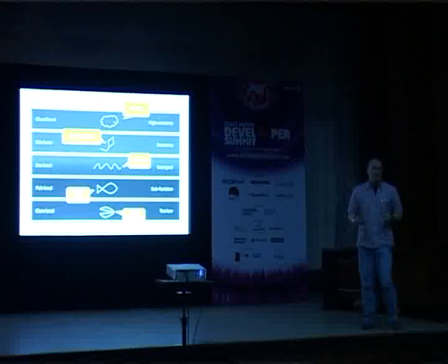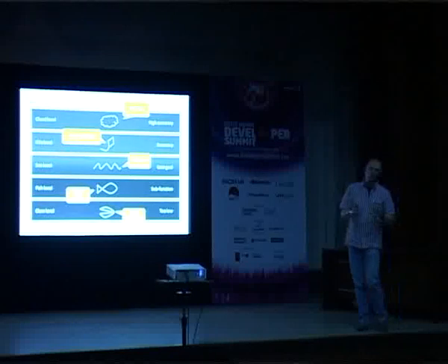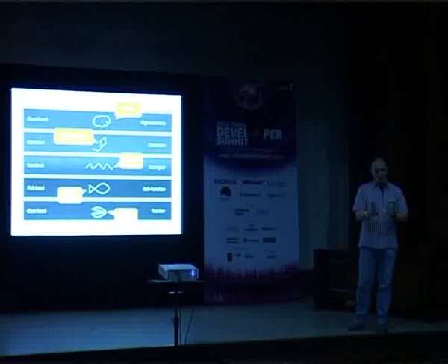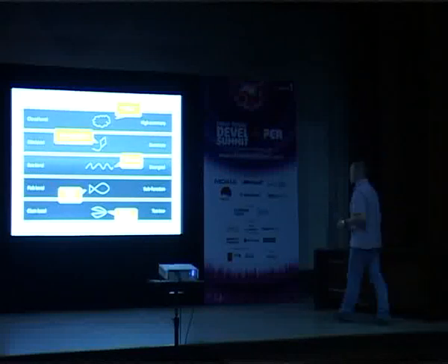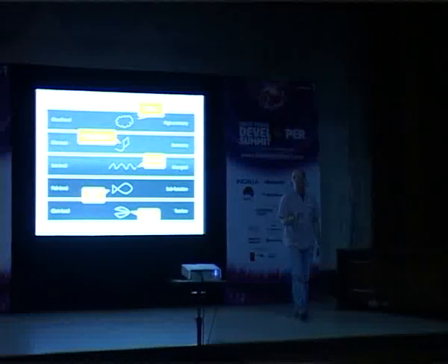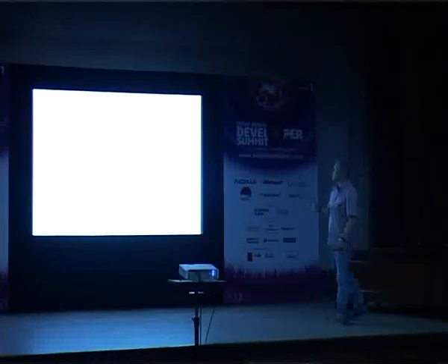I can tell you the numbers from my own project. We do about 25 smart use case points per iteration, which is usually around 5 to 6 different use cases per iteration with a not that big team. It's a team of about 5-6 people. So this is a unit of work that is actually doable. So I'll show you what it looks like.